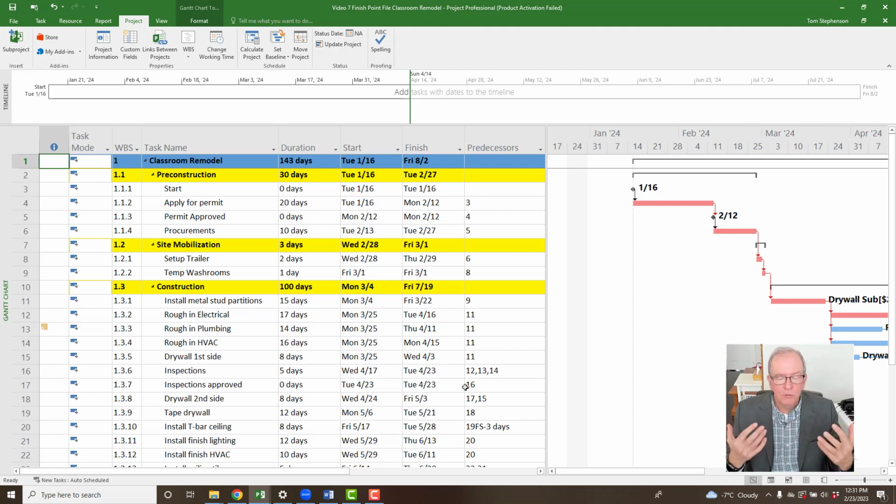And this is where we're headed in today's session: we have to set a baseline, but we have to understand that we need to have all of our information on the schedule that we want as our original plan. So we should be complete in our planning at this stage when we set the baseline, because the program remembers a certain amount of fields, and then when you want to check, well, what was originally there? What's the variance? Then you can look and you can find those variances, which is really helpful